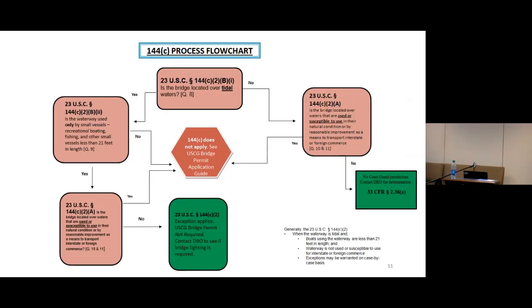Okay, you're going back to our tool. It is definitely located over tidal waters. Okay, and the next question we ask is the waterway used only by small vessels, recreational boating, fishing, and other small vessels less than 21 feet in length.